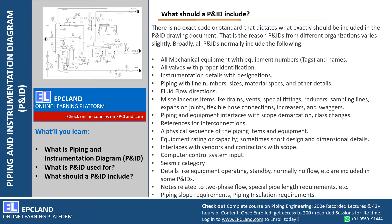For equipment in a P&ID, the top section of a page represents the design conditions and dimensional details of that particular equipment. Interfaces with vendors and contractors are also shown — for example, for compressors, lube oil or rundown tanks — what is in vendor scope and what is in contractor scope. Scope demarcations will always be there. Computer control system details, unit seismic categories, and equipment operating status details like standby and normally-no-flow are also included. There will also be a lot of notes on the P&ID related to two-phase flow, special pipe lengths, and process requirements.